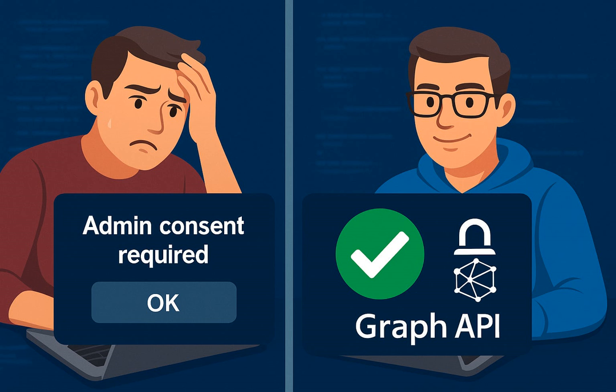Pre-approval workflows also smooth things out. If you know you're going to need admin consent, work it into your project plan. Get the permission list approved on paper before the code is even finished. Share sample consent screens and walk through exactly why each permission is necessary. The transparency pays off.